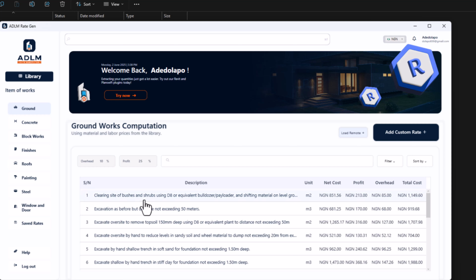Now this allows you to prepare your bill either based on the actual prices or based on the overhead and profit. So when you have a construction project to work on, you can either choose to prepare your bill based on the actual. So as a contractor, as a quantity surveyor, or even as a client in this instance, you can easily just quickly check the price. Once you have your quantities, just verify the rates here and you verify that against your contractor's rate.